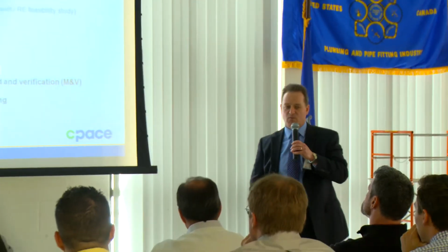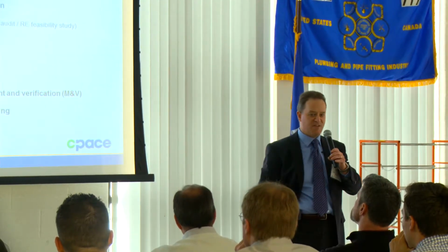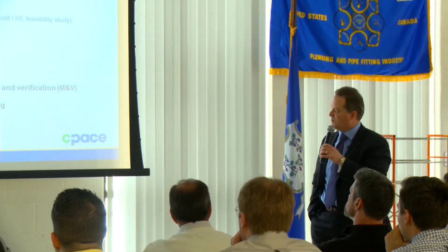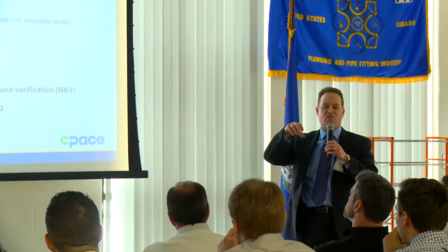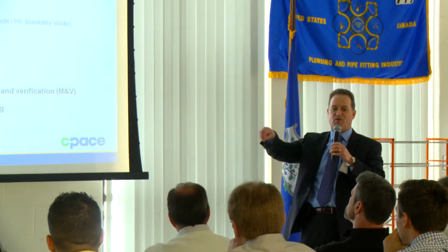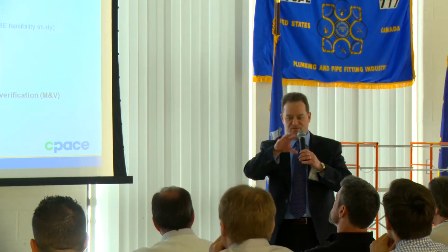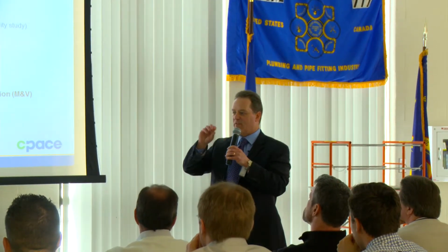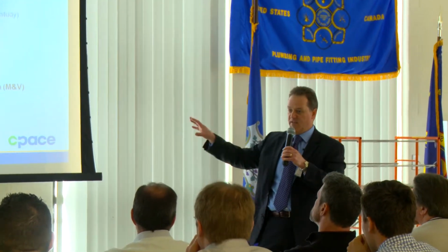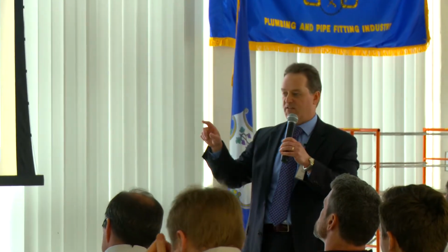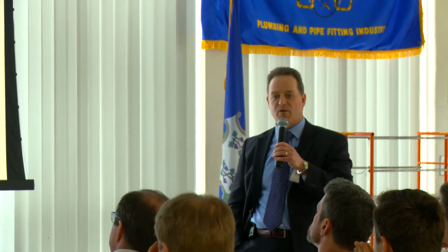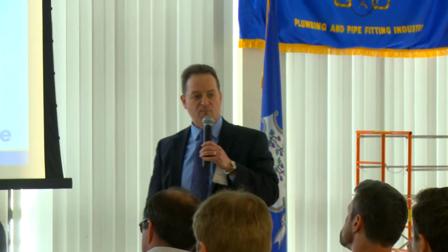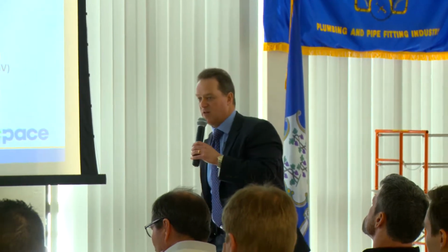Once we get to a point where there's consensus among those stakeholder groups, and I'm going to speak in a moment a little more about the different stakeholder groups, meaning the owner is bought into the project, and you, as I'm going to assume we're predominantly the project development role here, are comfortable that the project is optimized in your mind, it's meeting the building owner's needs, and it's meeting the financial criteria of the program, at that point we'll submit the project for technical review. And Anthony's given you a briefing on what that process is going to look like.